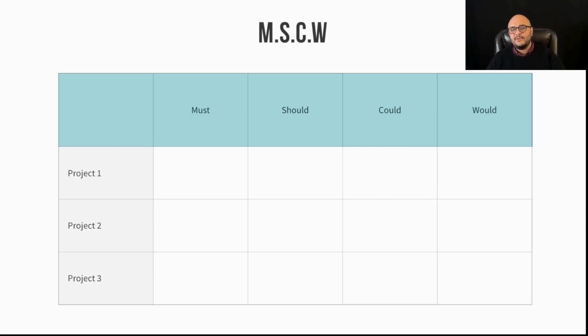Could, again, you're going down in priority. I could do this project. It's on my list, not that high in priority. I could do it. Would, sometime in the future, maybe we'll get to it. You rate each project separately under must, should, could, would, and you can even use MoSCoW as a tool separate from SWOT, separate from the weighted scoring model. A lot of times you'll see it put at the end of the weighted scoring model just as some additional info, because it's really, really useful, and it provides a very easy way to get a quick glance at project priorities.